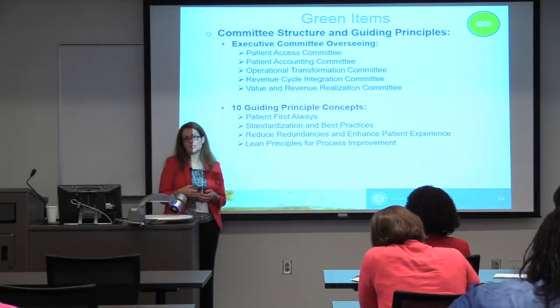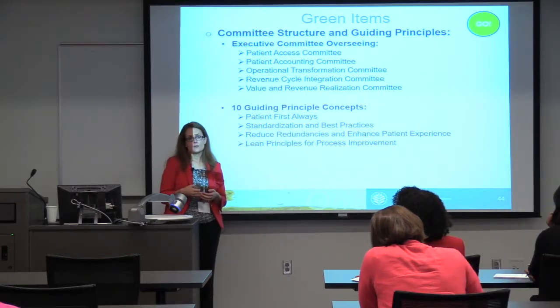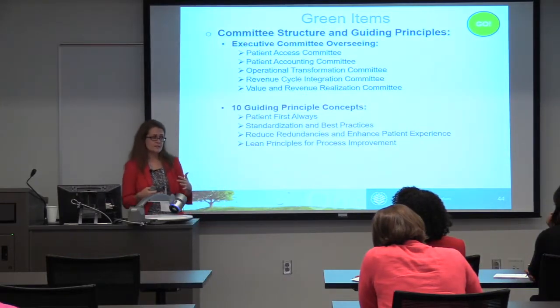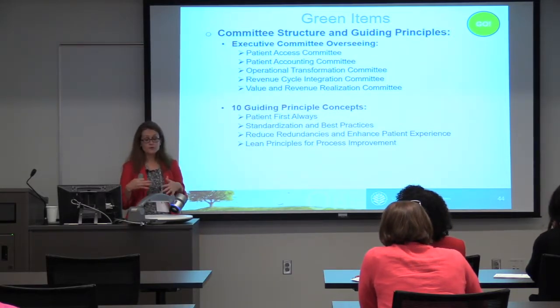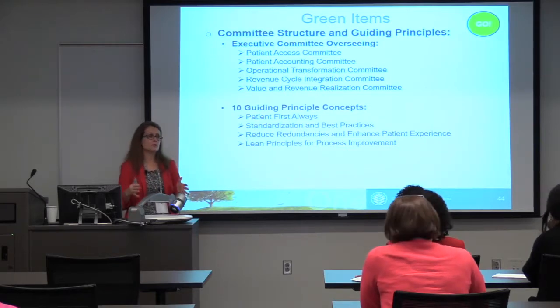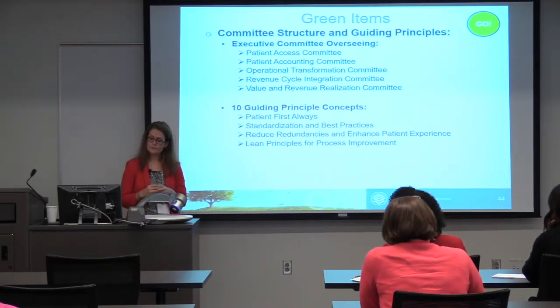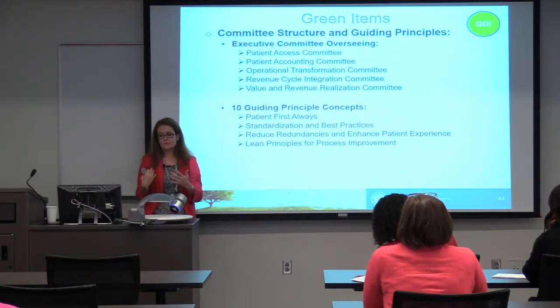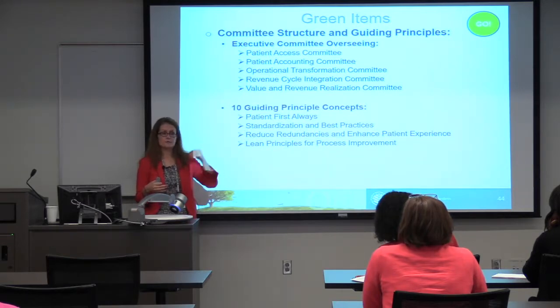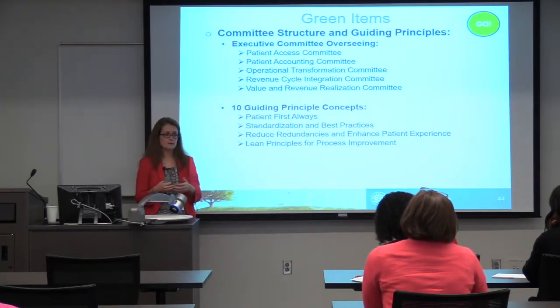We use the executive committee to approve all of our major scoping decisions. One of those that I mentioned was the Unified Business Office. That went multiple months to be able to determine, yes, that's what we want to do. We want to have one single business office. So I think our governance structure really worked to our benefit because we were able to get the right folks to approve high-level decisions, and then if it needed higher approval, those folks were able to take that up higher.